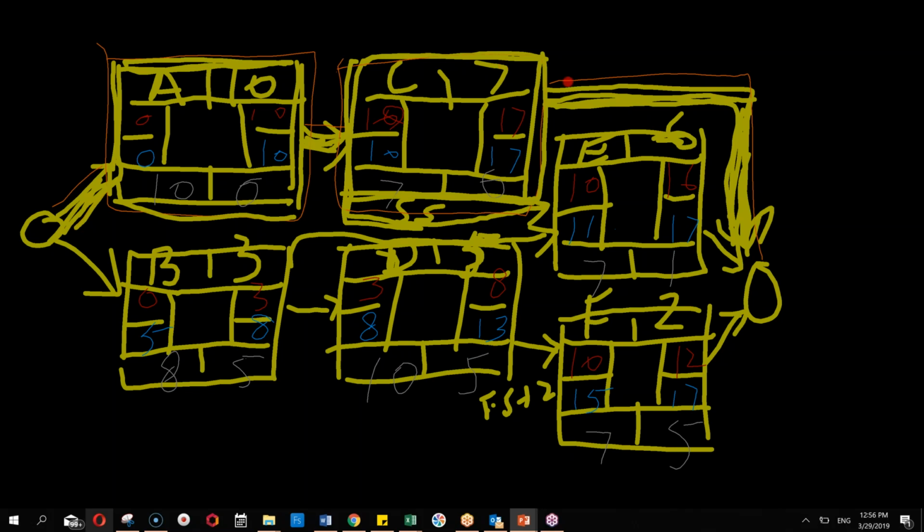Yes, the 17 coming from the top is clear. From the bottom, E is giving 16 and F is giving 12. The forward pass is fine. The three figures are 17, 16 and 12, the biggest figure is 17, therefore my project finishes on 17, got it? Therefore wherever the arrows come from, all the three arrows will carry backward 17: 17 in latest finish of F, 17 in latest finish of E, 17 in latest finish of C, got it?